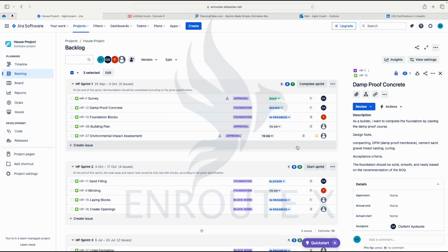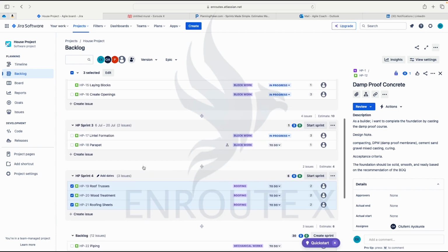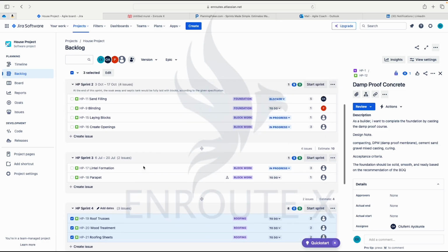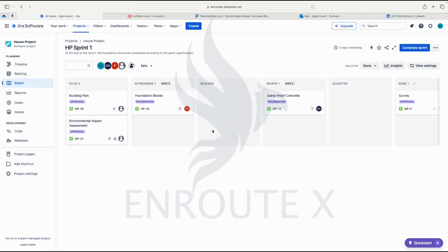What you'll find on the field mostly is that some organizations or some teams just move all their stories from the product backlog into one sprint. Boom. So they will do a piece of it, and at the end of the sprint, move everything again to the next sprint. Boom. And that's how they do it. But that is wrong. That is what we call an anti-pattern in Scrum. Imagine you look at this board, and instead of seeing just a few stories, you have 30 stories. How will you cope with it?